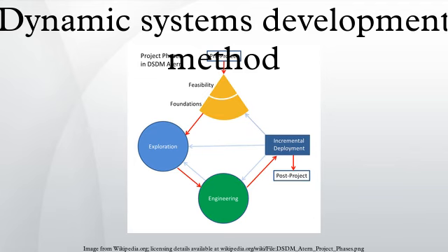End users approve the tested system for implementation, and guidelines with respect to the implementation and use of the system are created. Train users, train future end users in the use of the system. Implement the tested system at the location of the end users. Review business, review the impact of the implemented system on the business.